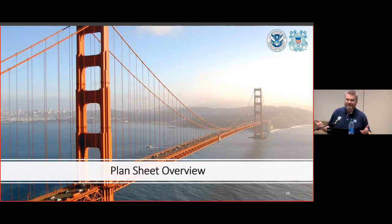As far as the timeline, how long it would take, we give ourselves, when we send you a letter that your permit application is considered to be complete, and like I said, when you send us the initial application, 9 times out of 10 we're going to say it's incomplete. And we've had some applicants pulling their hair out, like, oh, what do you mean? And it's like, no, don't take it personally, because we're still funneling you information. But when we say it's complete, then the Coast Guard's on the clock. At that point, we have 90 days to render a permit decision.